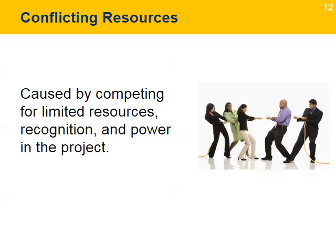Conflicting resources. Resources available in a project are quite often limited and in short supply, so it's not uncommon that team members compete for these limited resources to complete their work. When more than one person or group needs access to a particular resource, conflict can occur. For example, two team members need to use the project vehicle to visit different communities on the same day, and that creates conflict in the use of a limited resource. The project leader can help resolve resource conflicts by creating consistent, fair policies regarding the use of physical resources such as vehicles, computers, or even office space.